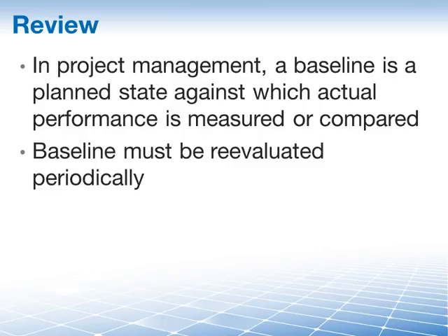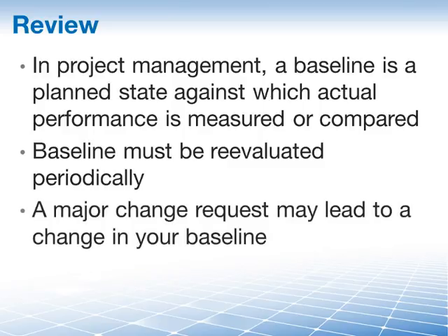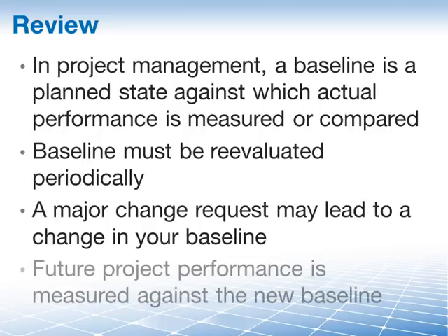If they are not, if we had internal performance issues, for example, we may need to rebaseline. A major change request may require a change in your baseline, and once you have rebaselined, that means that your future project performance is now measured against your new baseline. And this concludes our look at the project baselines.